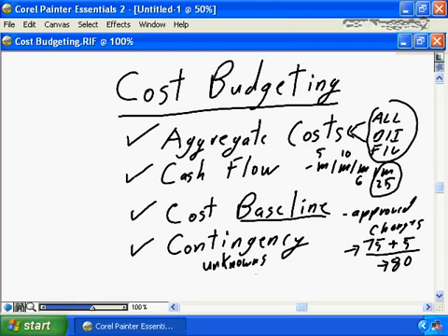So let's assume going in, we say there's going to be a 10% contingency. So that means our budget isn't $75,000. It's $75,000 plus the contingency, and for round numbers, I'm going to say 10% is an additional $8,000. So your total project budget is $83,000, and that's excluding change. Change would increment that ongoing as the project is delivering.